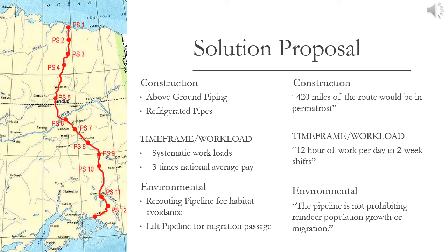This caused major concern as the pipes carrying hot oil in this climate for such a long distance would create unstable footing for the pipes. To address this problem, above ground pipes were used in those areas to allow for the pipes' footing to stay stable. As well, across the areas of permafrost, red pipes were used to help cool the oil so it would not further melt the footings. This was shown to be successful for the current issue, yet may cause concern later on.